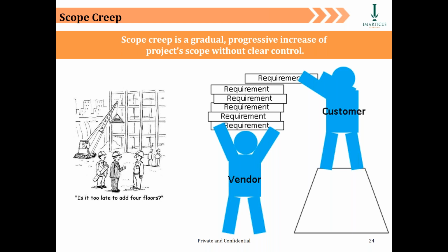And now the chief engineer walks up to him and says, "Hey, is it too late to add another 4 floors?" It's not a Lego piece, right, that you can just simply add another 4 floors. If you want to design a building with 8 floors, its foundation has to be way deeper and stronger than a building which has only 4 floors. But here, guys, the client is exactly like this chief engineer who has walked up. And the engineer you see is no one else but your business analyst.